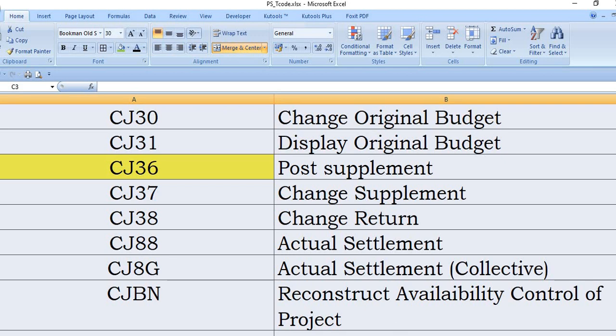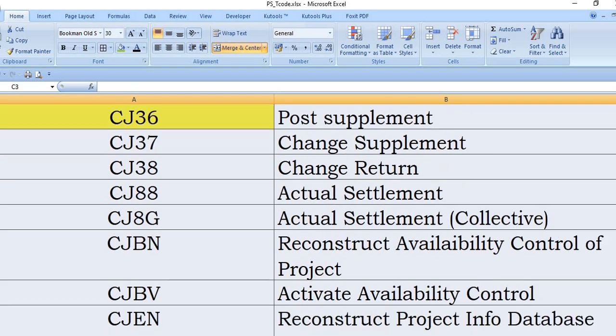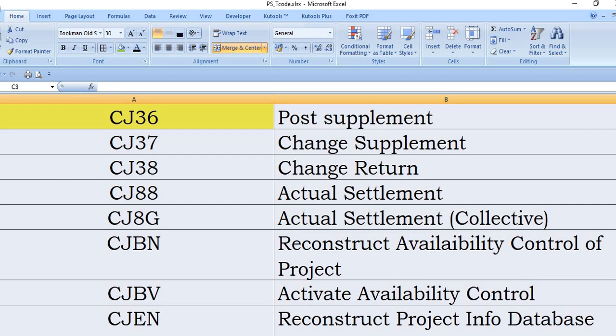From the WBS to PS cleaning and then from WBS PS cleaning to CWIP and CWIP to completely fixed assets. CJ8G actual settlement report. CJBR, this SAP transaction code is used for reconstruct the availability control of the project because sometimes users doing any work in the network activity may get the error like the budget is exceeded even though budget is already available in the project in WBS.